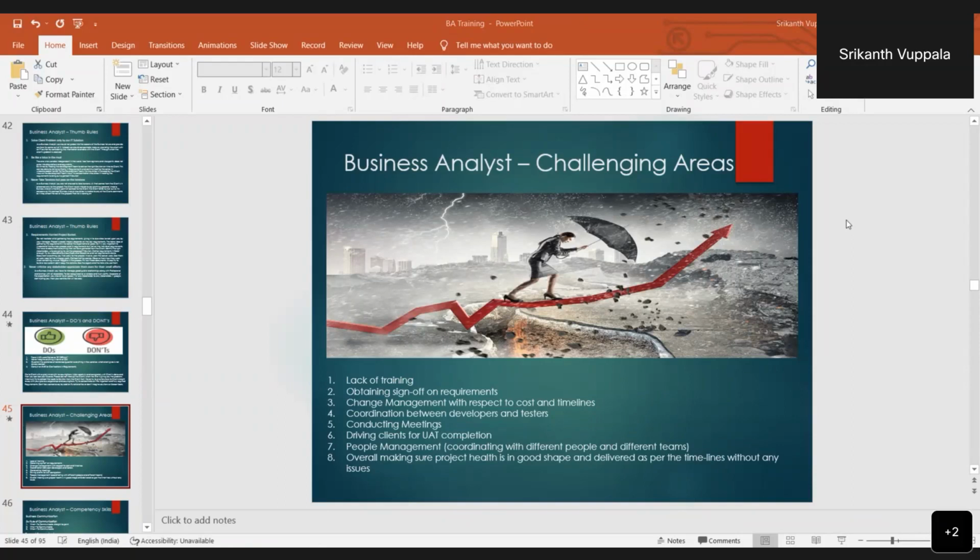Handling them is a big challenge for the business analyst. Why? Because we have to make the client understand that if we take these user stories or this development work, other stories will get impacted. We try to make them understand the impact, and we move some other stories to the next sprint. If capacity allows us to take those CRs also, we can take them into the current sprint besides the other stories.